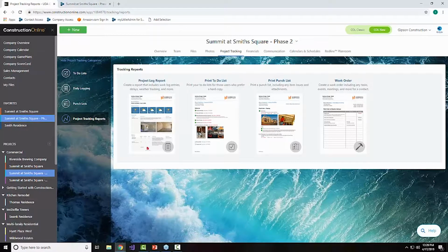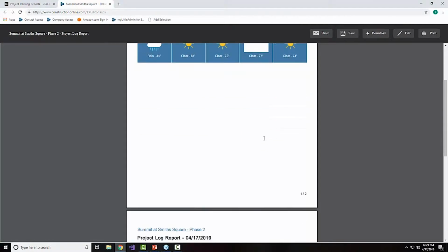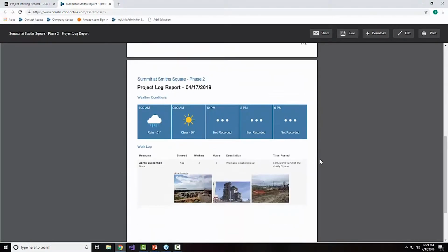So maybe you remember that something happened in December of 2018, but don't remember the exact date for the weather. You can go back and pull that weather report. Or maybe those delays are being logged, or maybe your clients brought their extended family over the holidays to visit the job site for every day that week, and that created a delay. But you want to have those things documented. Then the report is pulled, you have the information right at hand.